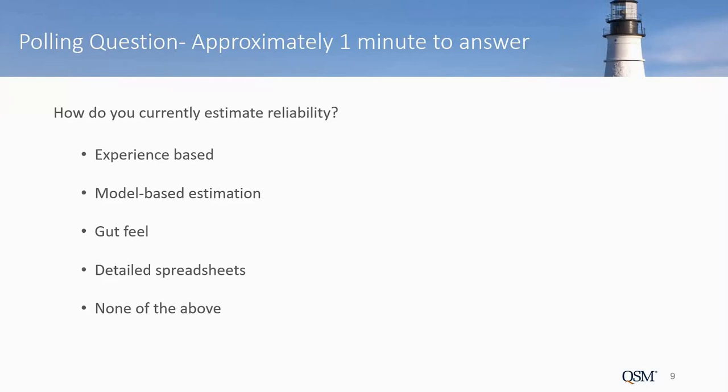And let's talk about that a bit. We find that a lot of project managers struggle with reliability estimating early in the planning process, like I had mentioned. A lot of times they don't factor in the reliability part of the equation with their cost and schedule plans. So one of the things we recommend, as you can see from this webinar, is to do a model-based reliability estimate. And this can be done in addition to the experience-based or the spreadsheet-based or whatever. Looks like most people voted for experience-based, but a pretty close second was model-based. The reason we recommend the model-based part in addition is because it can provide an objective view and a sanity check with historical data.